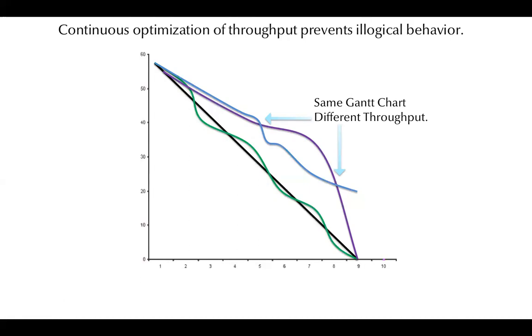So, Stefan, what do you think so far? It's a nice burn down chart. I'm sure that the velocity is not just the agile vanity metric equivalent to whatever on the Gantt side. It is more useful. I mean, knowing flow rates is really useful. You can project them. So it gives you an ability to adjust expectations early. You don't have to sit there and go, oh, we've slipped this much, but we'll catch it up. We can say, oh, well, we're going to have to adjust expectations numerically. What the numbers are telling us is this.